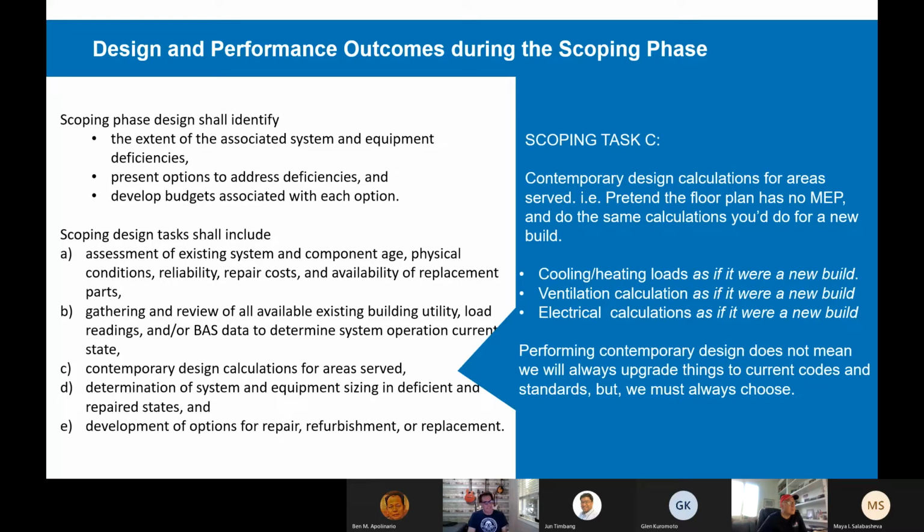So then task C, this is going to be new for a lot of design consultants. Most of our design consultants don't include contemporary calculations for their scope. In fact, I'll go ahead and say it. Design consultants never include this in their scope until we ask for it. But the way to think about this is that we should not assume that the previous design engineer's work was correct. If someone drew a set of plans 10 or 15 years ago, we're not going to assume that all of their numbers for all the zones were correct and still valid today.